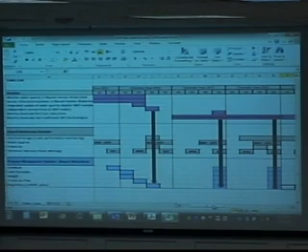So as we evaluate not only the overall objectives from a TMDL nitrogen perspective, but also, as it's written there that you can clearly see, evaluations from other demonstration projects, those are going to directly feed into these program management updates every year, and I think it should be done in the 4th quarter because it's the dead of winter and it's a great time to be looking at data and evaluate what you've done, because most of the work of these non-traditionals happens in the spring and the summer and through the fall.